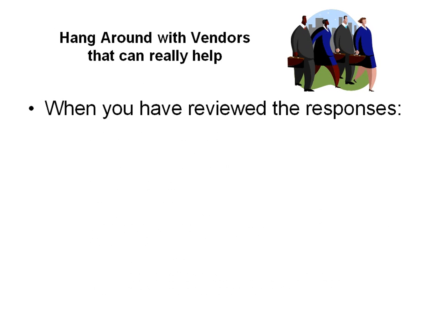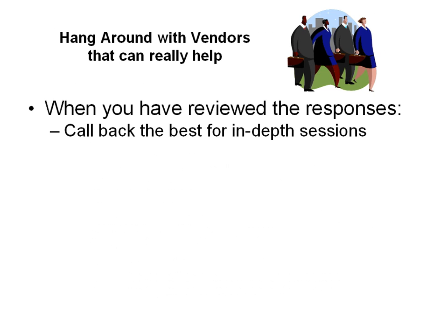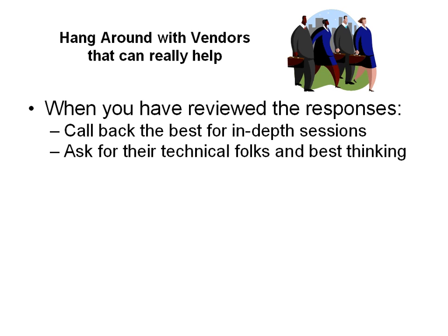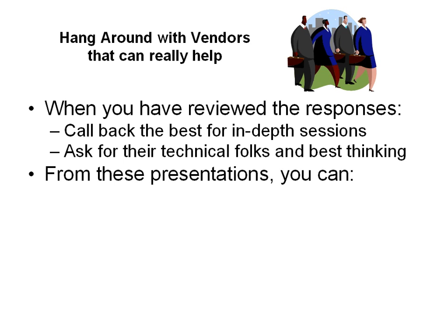When you've reviewed the responses, and you're not going to get as many responses as you sent out RFIs, you want to call the best back for in-depth sessions. You want to sit down with them and talk about what they responded with, what they think they can do for you, and give them a chance to explain themselves. Some will come in, especially if you've shown them some sample data in the RFI, with a demo for your data. You ask for their technical folks when you call them. You say, we don't want the sales folks here, although feel free to have a salesman in the room. We want your technical and systems folks. And if a firm is honest, most are, they'll do that. They'll send a technical person who understands what they can do, understands what their limitations are, and can talk with you about this.